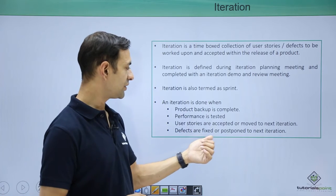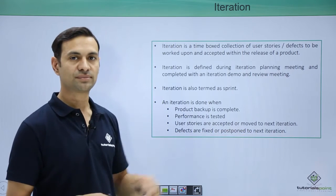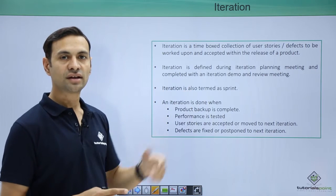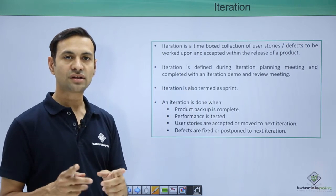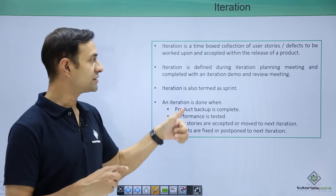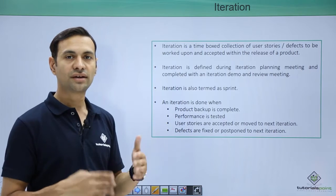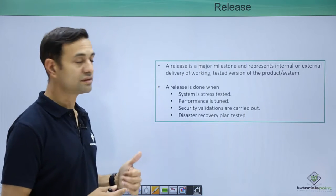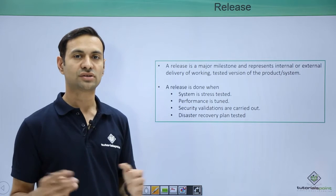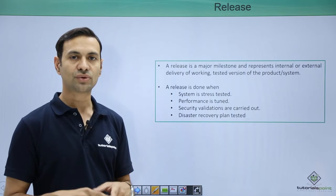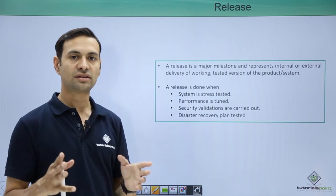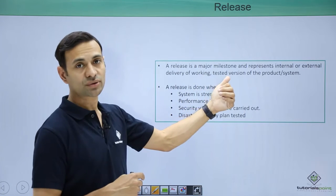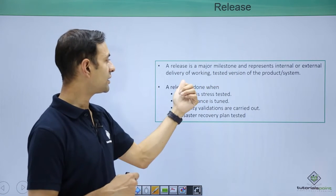An iteration is done only when each user story and defect in the iteration are in an accepted state. If not in accepted state, they should be moved to the next iteration. Defects are fixed or postponed to the next iteration. Once iterations are done, we come to the next artifact: release.